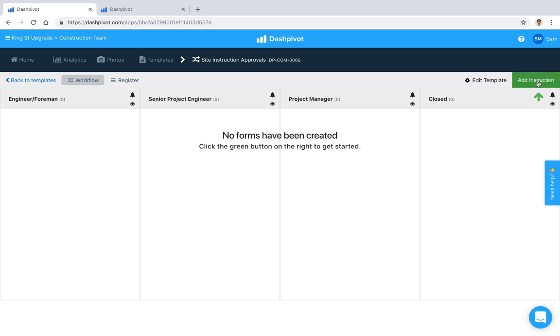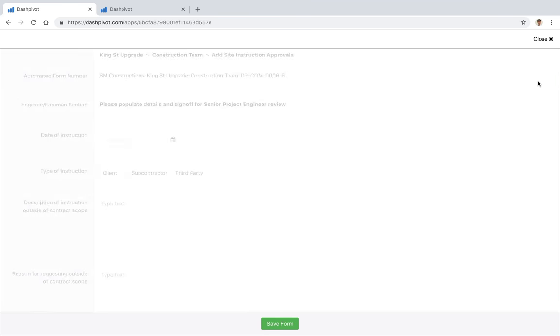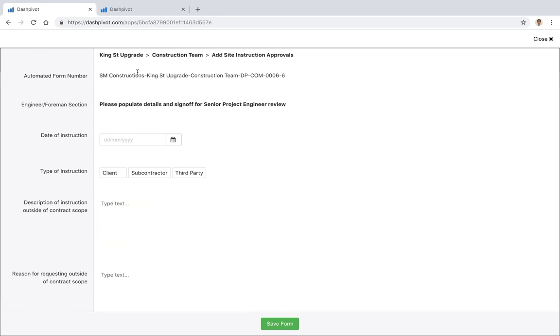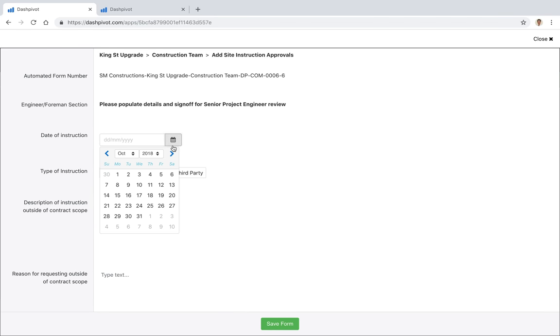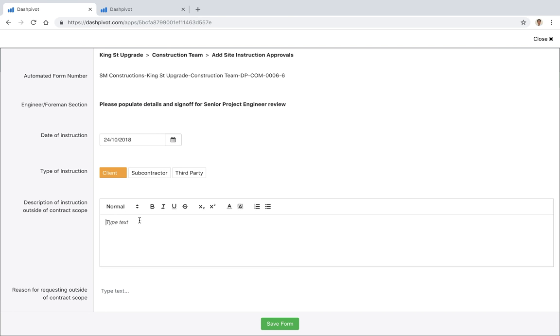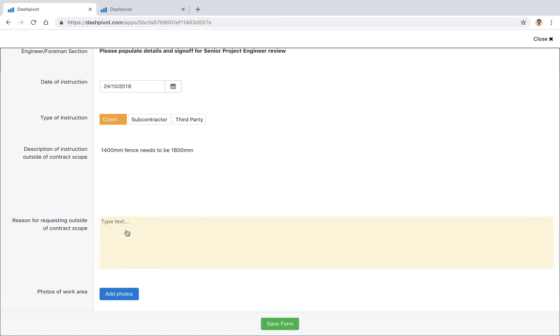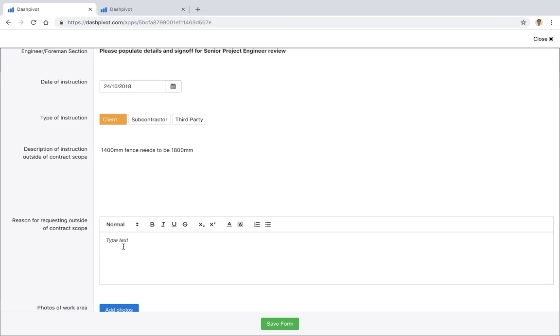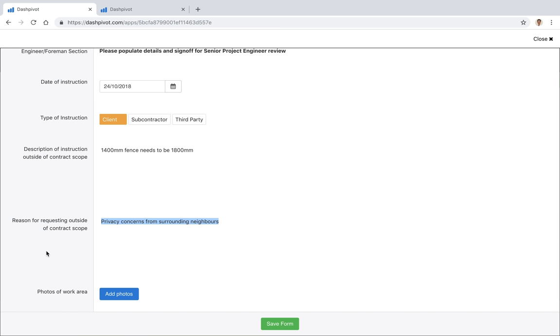I'm going to go ahead and add a new instruction. You'll see that we've got the template set up already. I can come in here and add the details of this particular instruction. Maybe it's from the client—1400 mil fence needs to be 1800, a change in scope. The reason for it might be privacy concerns from surrounding neighbors, something like this.